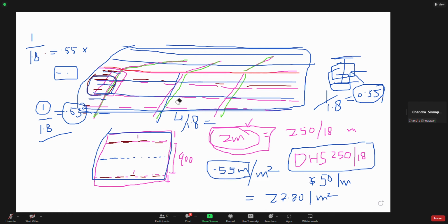They should know how we did that in the weatherboards. We take 1 square meter of weatherboard and calculate the length in 1 meter. If they give the effective length for the weatherboard, we divide 1 by it and add 1. That is the number of weatherboards in 1 square meter. Then we calculate how many lengths in 1 square meter: 1 times the number of weatherboards which we calculated.